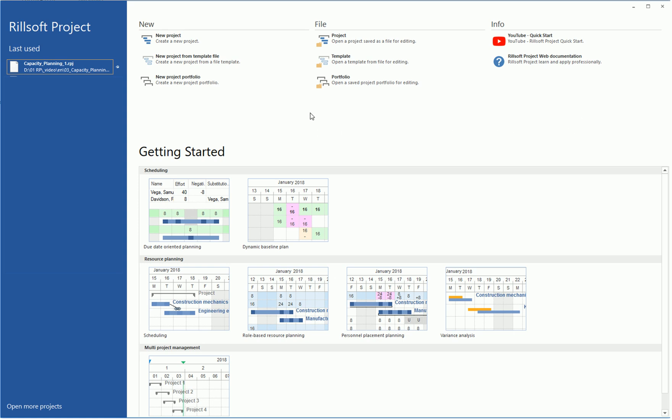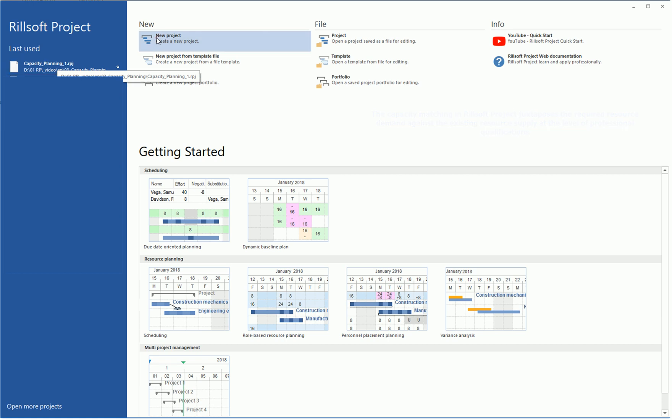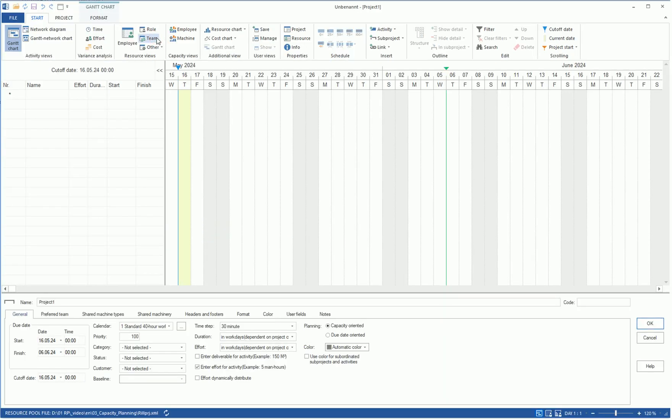The capacity matching in RILSOFT project juxtaposes the required resource demand against the existing resource supply at the level of professional qualifications. Since the available work capacity relies exclusively on data from the resource pool, establishing a resource pool is crucial for capacity matching.